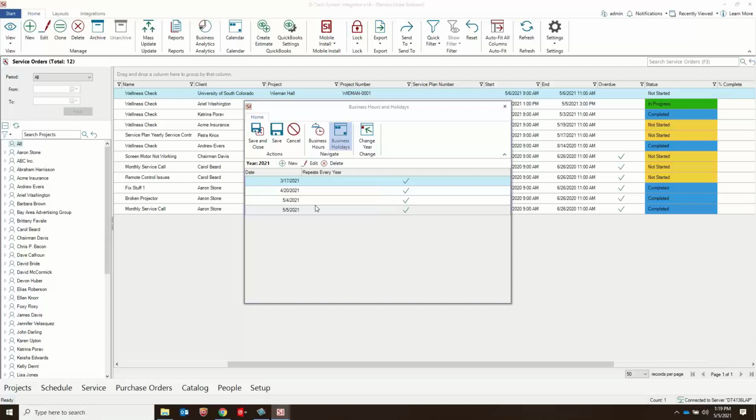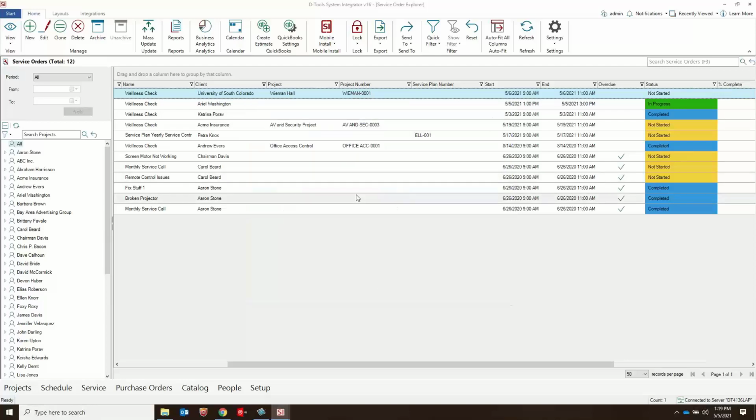And this is a step in the right direction for us. We're heading towards being able to put time off for individual resources. So this is what we had time for this release. We did the global holidays, and we'll get feedback from our users to see how they like it. But we are going to have to start looking at allowing, this resource is not here this week or these 3 days. That way, when your project managers go to schedule, they're not scheduling somebody who's not available. And so we will be heading that direction soon, but this is our trial at that for the business hours.